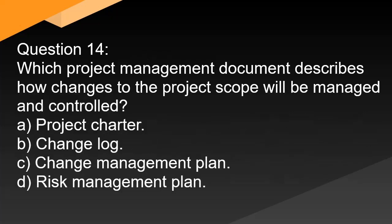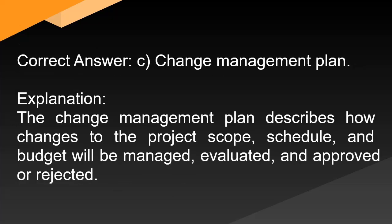Question 14: Which project management document describes how changes to the project's scope will be managed and controlled? A. Project charter. B. Change log. C. Change management plan. D. Risk management plan. Correct answer: C. Change management plan. Explanation: The change management plan describes how changes to the project's scope, schedule, and budget will be managed, evaluated, and approved or rejected.